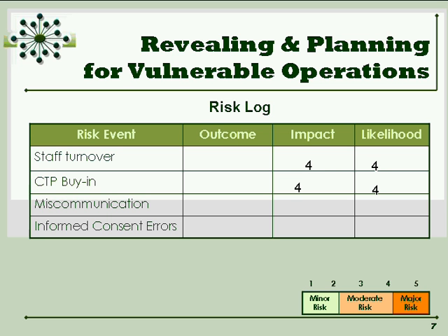So the outcome here was we couldn't randomize our participants. And if you're familiar with CTN 27, the issue is participants must come in withdrawal to randomize into the study. And if you can't randomize them when they're in withdrawal, you're most likely going to lose them. So the impact here, I would actually rate as a 5. We couldn't randomize participants into our study. And unfortunately, the likelihood in such a long trial of there being some sort of mechanical error is probably pretty high. I'd rate that as a 4.